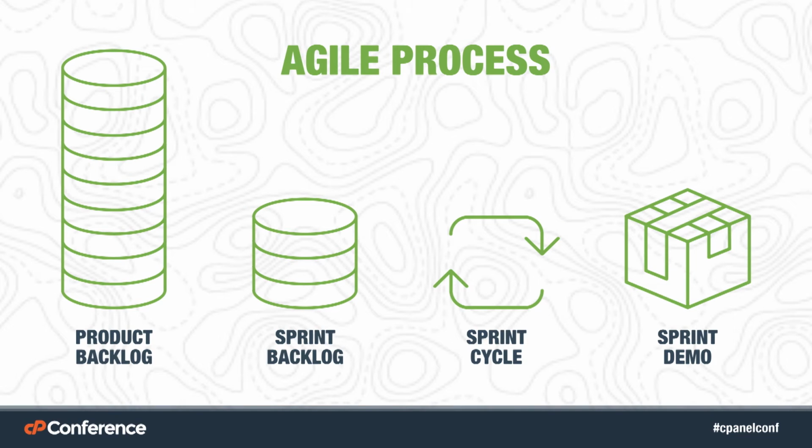So your product backlog can be, not a 1-year marketing plan, not a 15-month, 16-month, it can be 3 years out. There's really no timeline with how long a backlog can be. Where you break it down is when you get into your sprint planning, which is the next step. You take what's at the top of your backlog because you've prioritized the work based on business value, and the team agrees on what they feel like they can commit to in your sprint cycle.